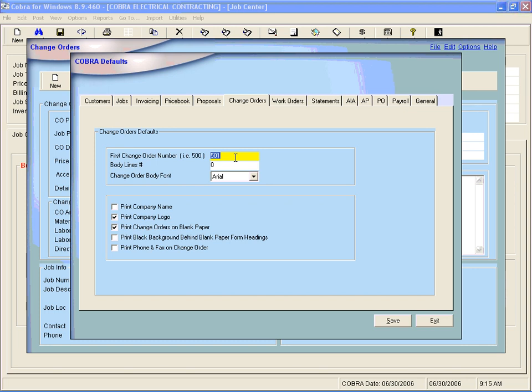Now remember that with change orders, it's going to be very important to do everything by page, so that we can track the change order, the cost of the change order, and we can even bill it out separately by page. So this is where pages are going to be very important. If you wanted to review my help topic on pages, that might give you a good idea.